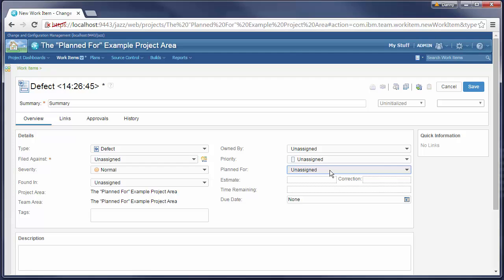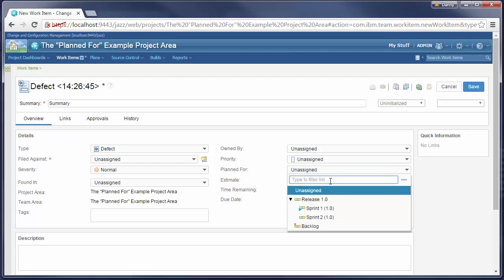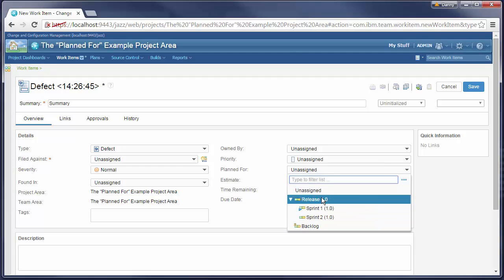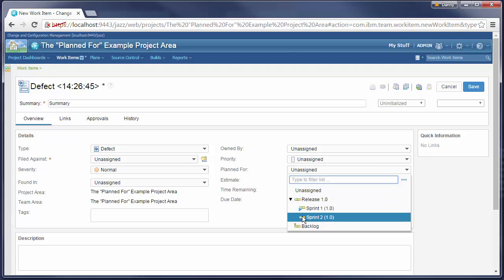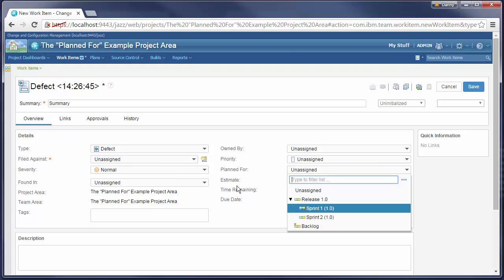In the Planned For drop-down we only see iterations from the main development timeline. There is no category selected and the project timeline is used by default.